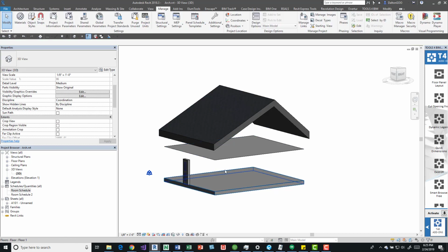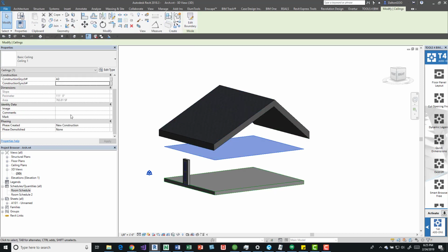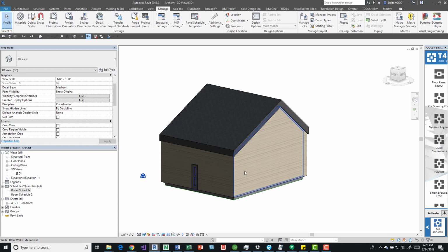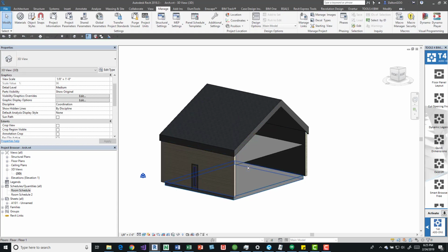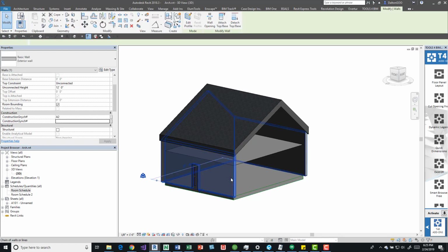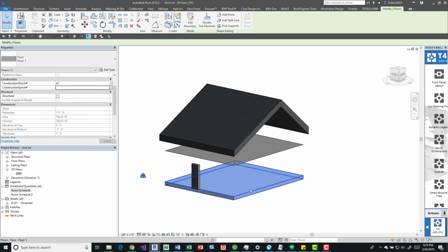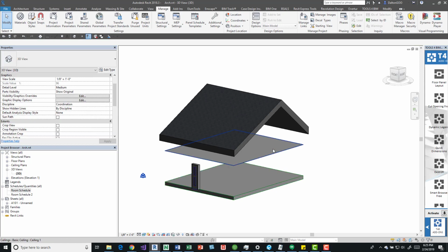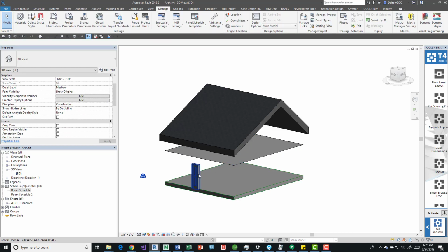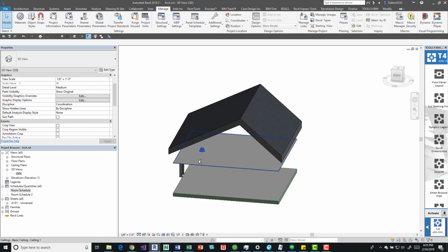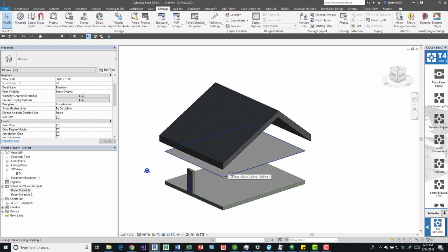So I went ahead and applied this. Just so you guys have an idea, the walls have A2, so I'm going to select all the walls real quick. So that's A2. The slab has A1, so that's the first bit. Then the walls. Then I'll have the ceiling go up. It's A3, the roof, A4, the door, A5. This may not be typically how you would build a building, but I want to keep this as simple as possible and just give you the visual idea, and then the picks and clicks that would get you to where you need to be.